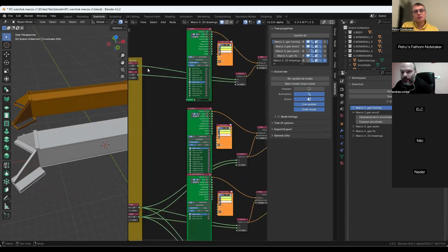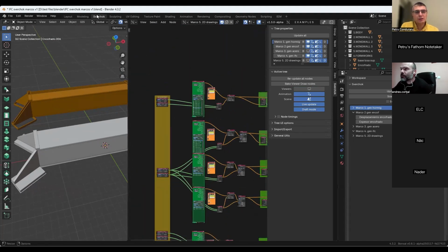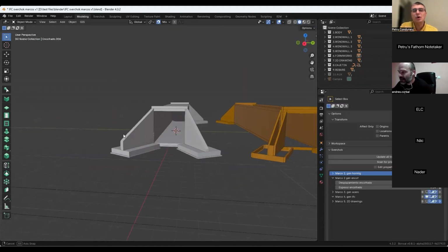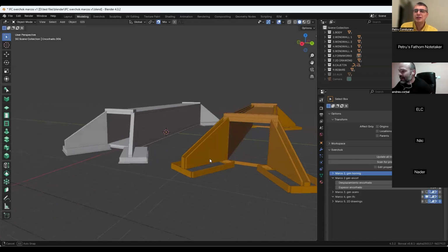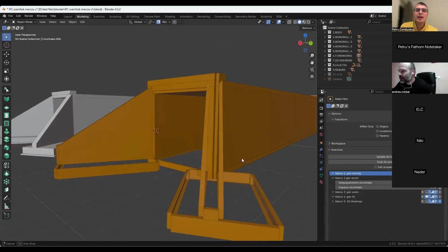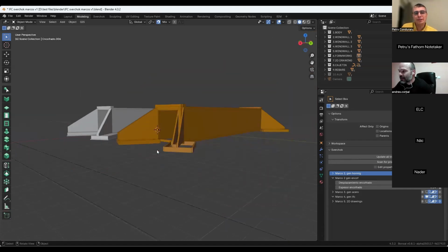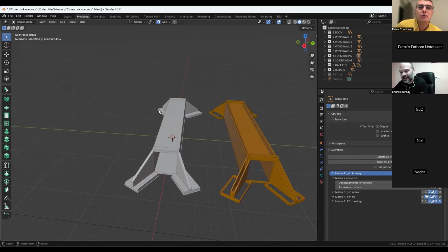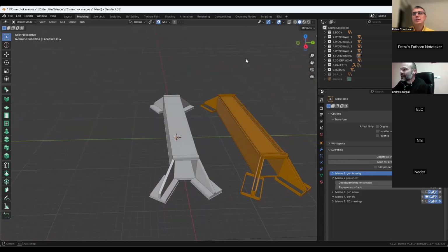Let's look a bit at the model. If I understand this correctly, the gray one is the concrete culvert, and the orange one is the formwork, right? Can you export this into quantities? What is the workflow to get quantities and know how many square meters of formwork you will need for this structure? Yes, to extract quantities you first have to export to IFC, and then reload this IFC in Bonsai. You do it with Bonsai with QTO, as Yasin showed in his videos.